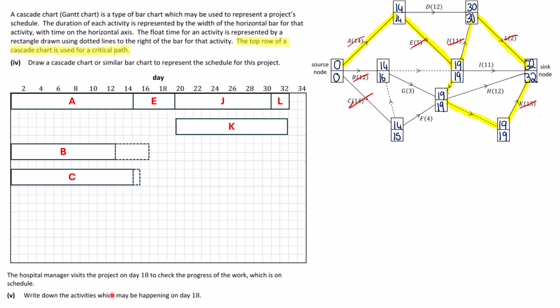So in terms of what that looks like, let's start at 14 and draw a rectangle that is of length 12. That will bring us up to 28. And then that leaves us 2 boxes to bring us up to 30. Okay, so we just get that little bit extra there. So it's absolutely fine to use your activity network here. Just use it sensibly. So it's going to bring it up to 30.